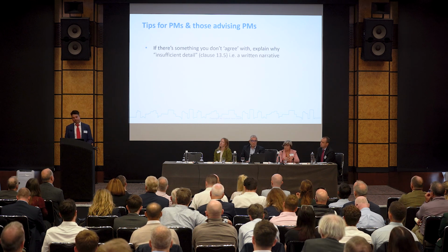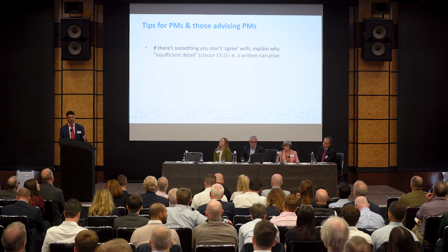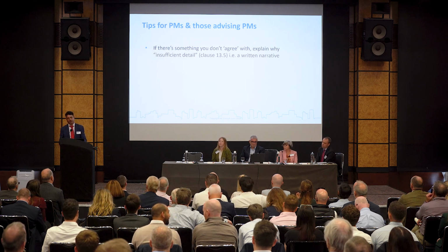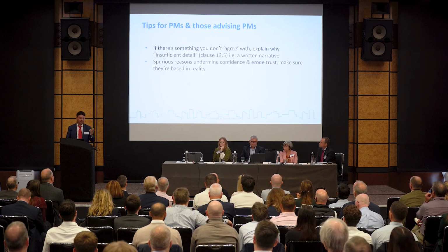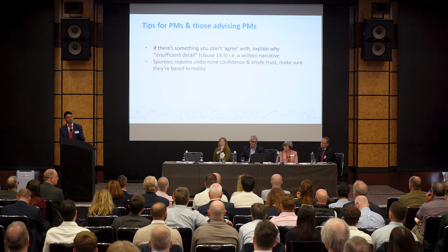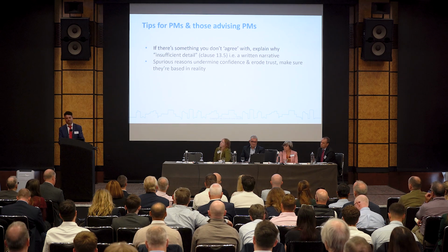PM's side now. If there's something you don't agree, again, explain why in sufficient detail. A written narrative. That's what the contract requires us to do in NEC 4. Personally, I didn't need those words in NEC 4. I was doing that anyway, because I thought that was good project management. But the words are instructive. Spurious reasons for rejection, again, undermine confidence and trust. So make sure your reasons are real.